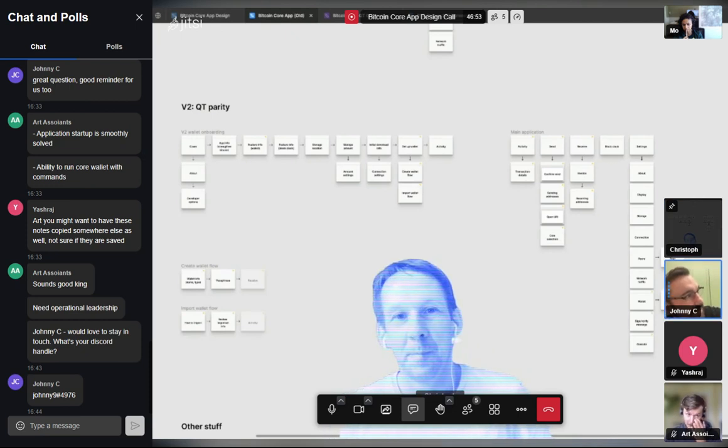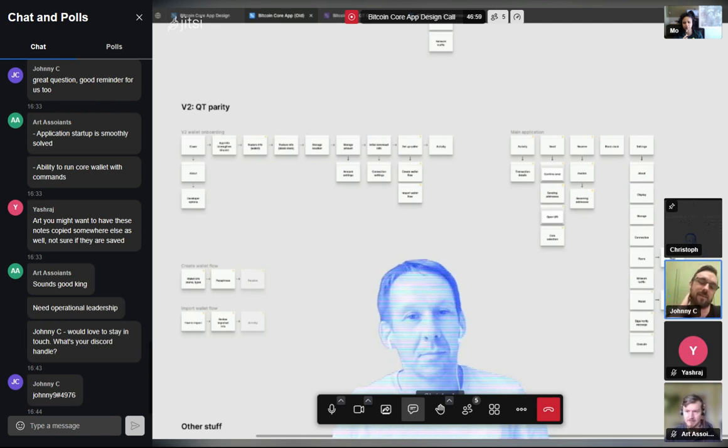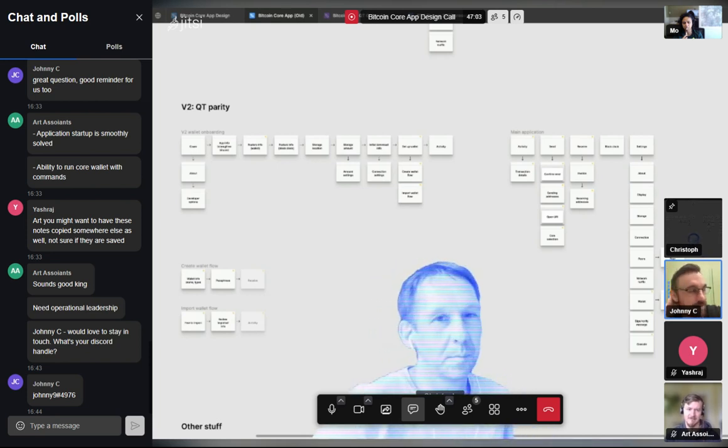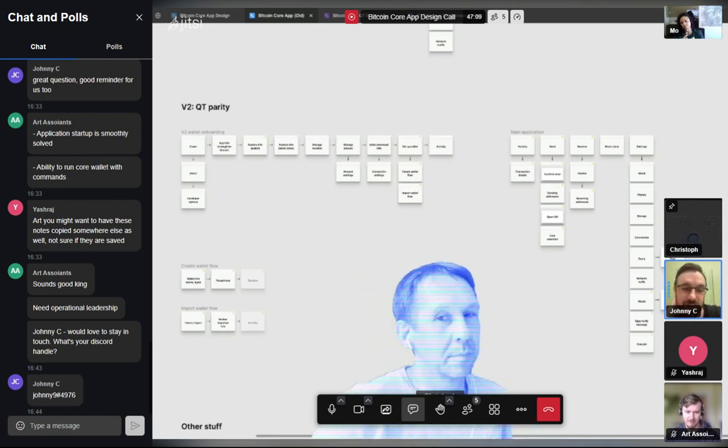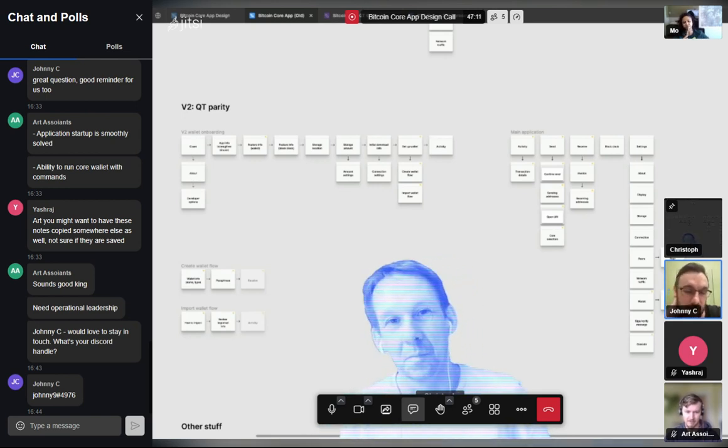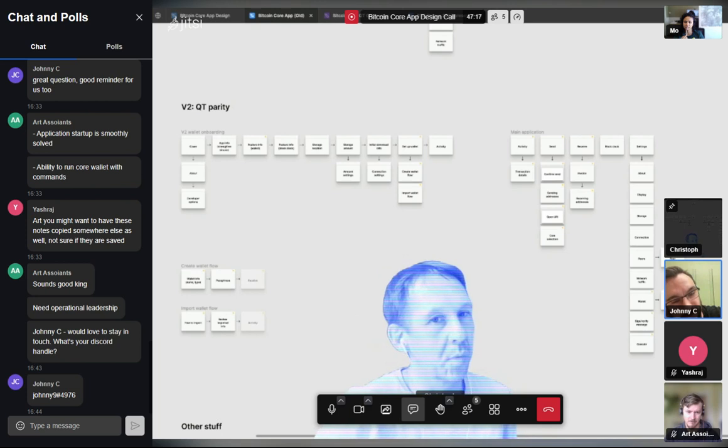So the one hang up I think I have is, is our navigation good? Do we have that defined? Because that's going to be a basis for all of our screens, right? So we need to make sure we have that basic navigation framework figured out. Then once you have that, you can start to parallelize the screens, right? Because you have some kind of constraints for what each screen would look like.